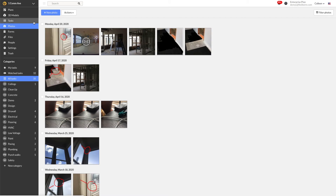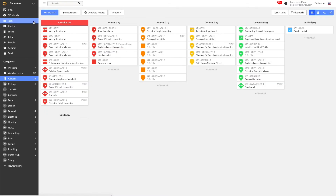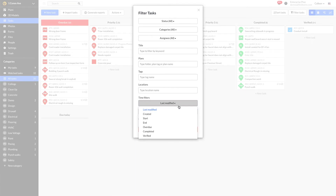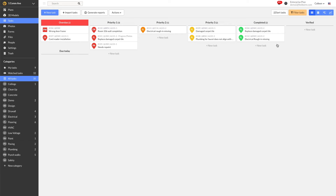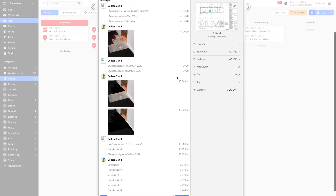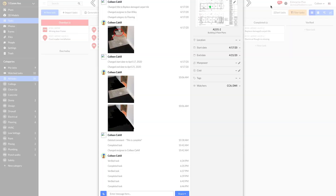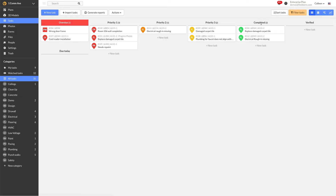Now, onto deficiencies. Once I've reviewed yesterday's photos, I'll head to my task manager to view all of the tasks that were updated in the last day. I'll come to filter tasks and adjust it to show everything that was last modified in the last day. I'm particularly interested in the completed column, as these tasks are all awaiting my verification. Remember that only project admins have the ability to verify tasks. I'll review each of the completed tasks along with the photos and videos that my team took of the final product. If the items meet our quality standards, I'll drag and drop the tasks to verified. Remember, verified tasks become archived after a certain period of time, which is indicated in your settings tab.